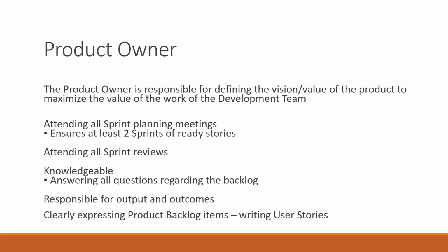So maybe the product owner added something without you guys noticing, right? Because sometimes product owners do things like that. They will add a story into the sprint without even notifying anyone. So being mindful of your burn down chart can help you point out things like that and even bring it up in your meeting and make sure everyone is accountable and also understands what we're trying to do, right? That's part of you helping to coach the team and becoming more mature or agile, if that's what we want to call it. So I just wanted to add that as well.